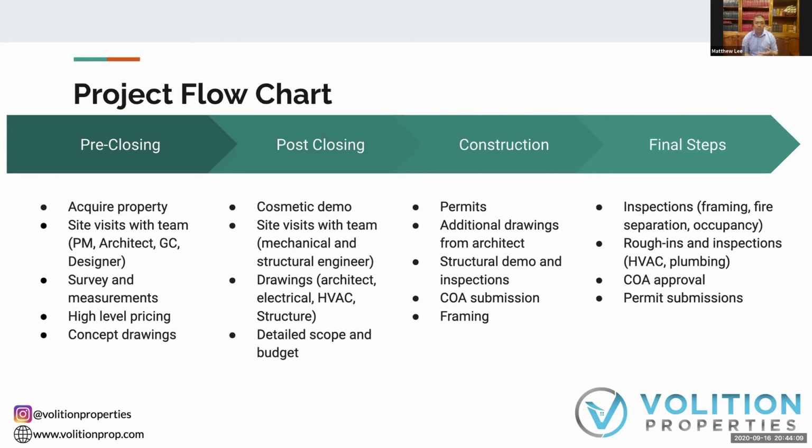the sewer systems need to be upgraded. The road systems now need to be upgraded. Electrical systems need to be upgraded to support a new condo build. But if you're turning a house and adding 1 unit, development charges were never intended for just an additional unit. So what we do is we build it as a 2-unit property, and then we add on a unit and make it 3 units, and that's a permit. And then we add on a 4th unit as just another permit. We're doing an incremental process to add on these units.